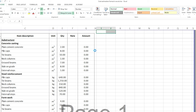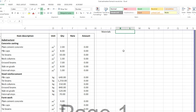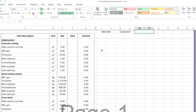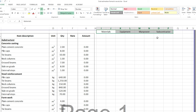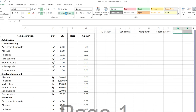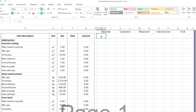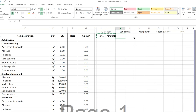Here I want to make the rate breakdown analysis. I want to start with materials, so here I'll put materials, and here equipment, and here manpower — these are the cost elements that we have — and here subcontractor. For each of these four cost elements, I have two columns, and then the last one will be the total. For each cost element I have rate and amount, even for the total as well.